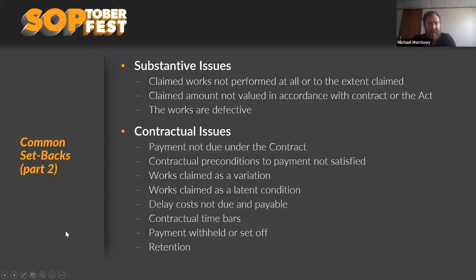There are also substantive problems seen at adjudication: works claimed haven't been performed at all or not to the extent claimed; being overly ambitious in the claim amount; the claim value not reflecting what's been agreed under the contract; defects in the works; and contractual issues like payment preconditions not being satisfied, whether works are valid variations, latent conditions, entitlement to delay costs, or claiming general damages for delay.